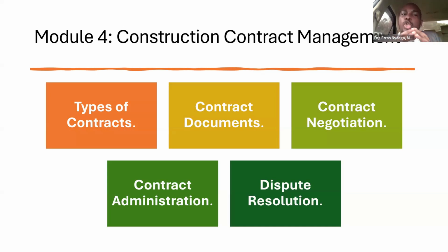There is not a single contract that is appropriate to all these different individuals, different organizations, or the different people that you'll be engaging in the course of the project. So you'll realize that you need to customize a given contract. There'll be a contract for the main contractor, there'll be those for subcontractors, there'll be those for services, and of course there are those for employees or the different laborers who will be involved.